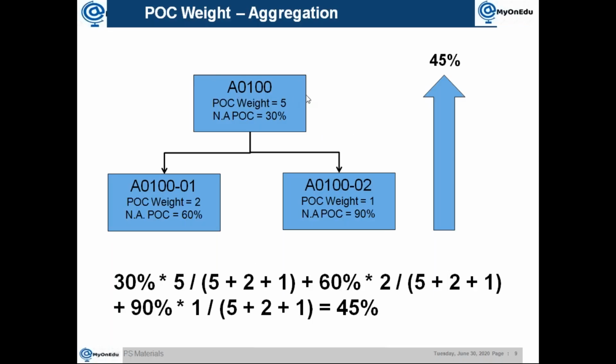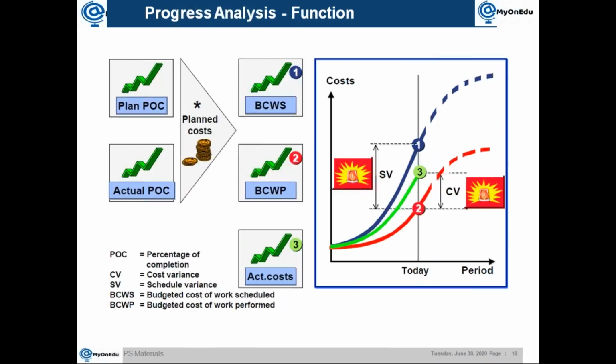It is always better to give it manually, because you will have more flexibility for the users, or you can say the business. They can put the weightage because they know what weight is to be put. So they normally put that weight, then based on that, the system will calculate. This is how the calculation is happening.